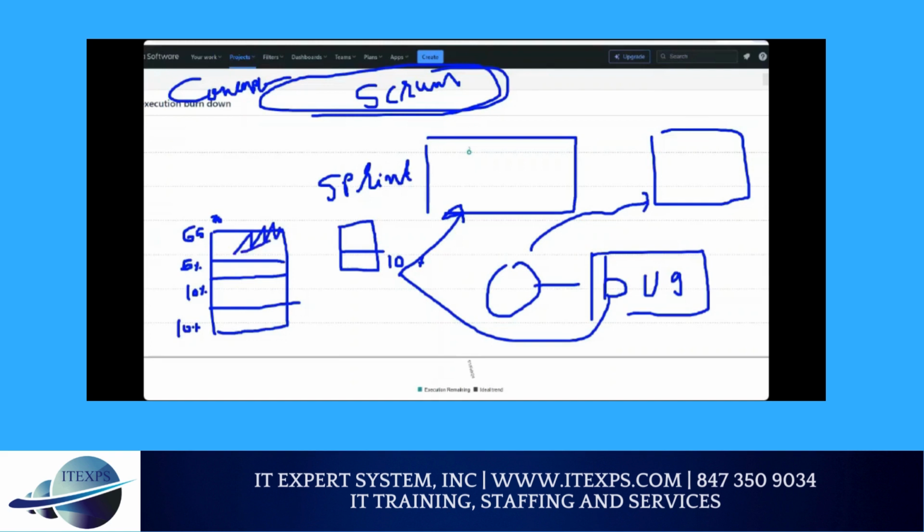So we never go over capacity. Even when we say team capacity, team velocity, we reduce our capacity because we know that our product is in production. Customers will complain, some issues will come. So we need to consider unexpected behavior, so we reserve capacity. If there is no production issue, we use this time for development, but we reserve it so we can manage unexpected outcomes. Sometimes there are a lot of production issues and customer complaints.